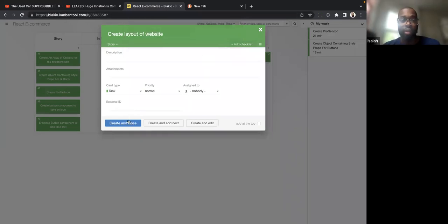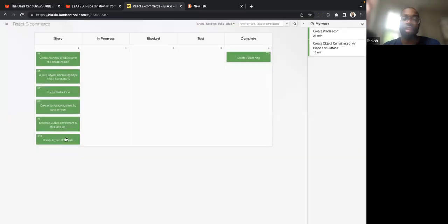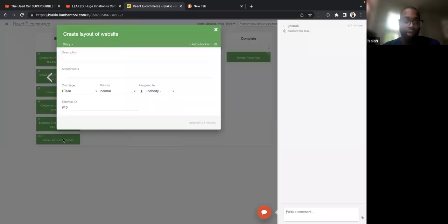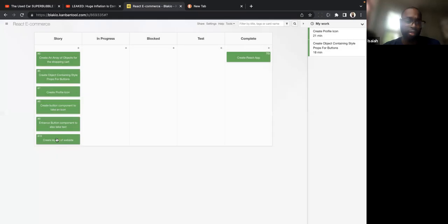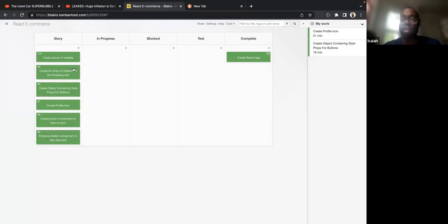Hold on, cancel that. One thing I forgot, we can drag it up top. Can we do that? Yes. And this is good too. Terrence, what you would do is order all of these things in level of priority. Everybody else grabs from the top. You see something at the top, grab it. If you don't know how to do it, you make your way from the top on down. But the highest priority thing should be up top every time.